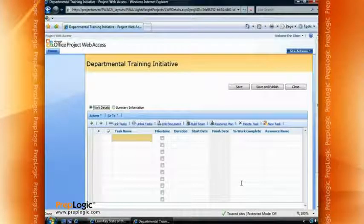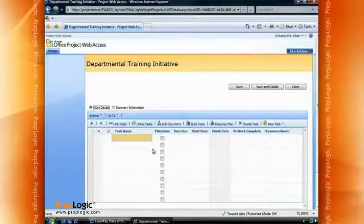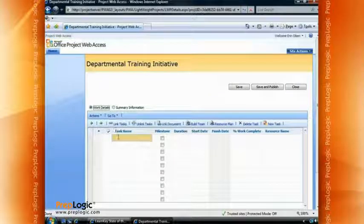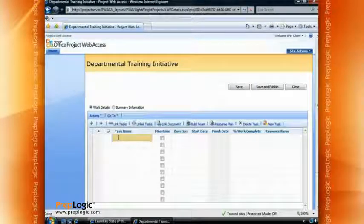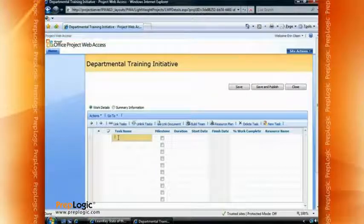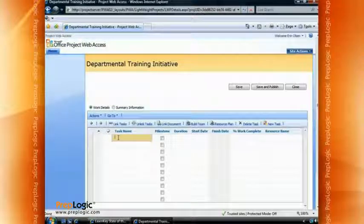Once this is saved, it comes up in its own web page and we have the ability to work on the details. When we first started this we worked with the summary information; now that we've done that, it opens to the detail view. This is where I can simply enter tasks — just like it would be in any version of Project. We're going to enter a task name, mark it as a milestone, put in a duration, and allow it to automatically calculate the start and finish dates.